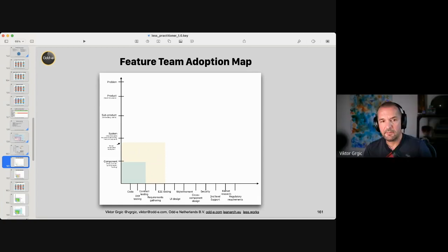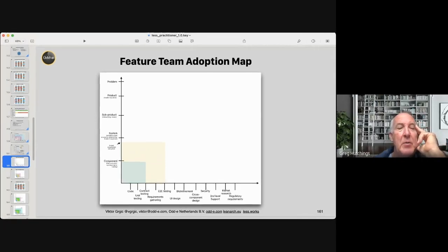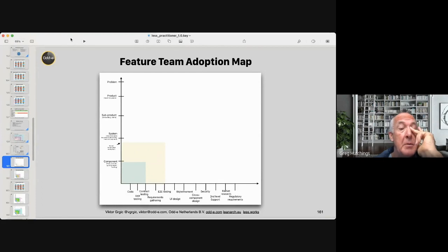Okay. Greg? I have the feeling that there may be a slight difference in how we teach and how we do it. But just to comment briefly on Alexi's question, I ask each team to write on Post-it notes everything needed in order to deliver an item. In a sense, everything that would be in the definition of done as well as the undone work. And I have them order it from left to right based on what they already can do. They're strongly competent on the left, and what they're starting to learn or would like to learn is towards the right. That's the logical sequence.